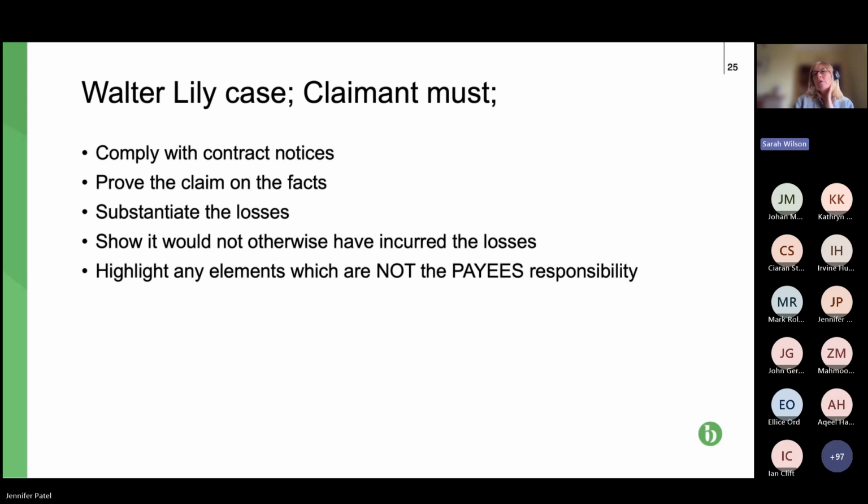So just be aware that I don't think that would work if you said, I've missed my 8 weeks under NEC 3/4 for notifying a CE. So, let's use a common sense approach and say I didn't need to notify. I don't think that would work. So, just be warned about that. So yeah, if we can move to the next slide, please.